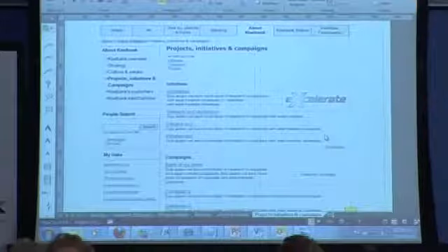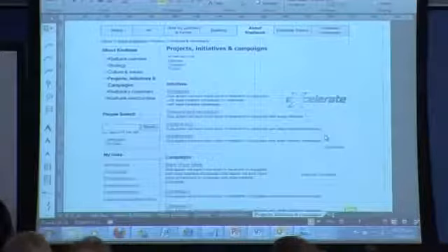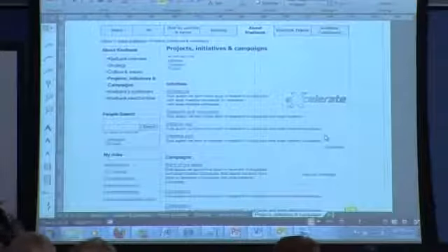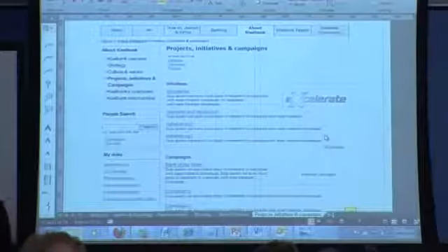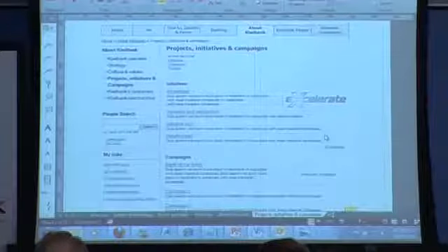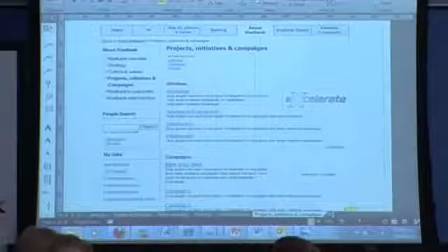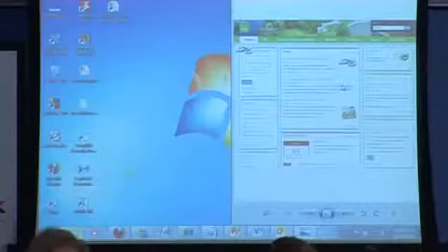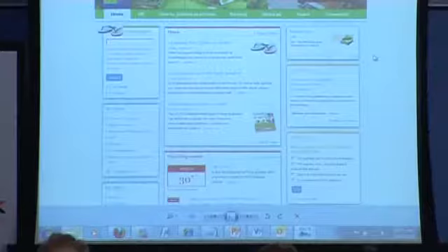You can actually go quite into detail of how this all works before you even do any of the development work, so that it's actually quite clear. It's clear to the end user, clear to the customer, clear to the project manager, so you go through that scenario and then walk through that before you build it. Yeah, exactly. This is storyboarding, but yeah, we call it wireframes. But this company, they're pretty good. It saved us a lot of to and froing, because it was quite obvious as soon as you looked at the wireframe, you can go to detail and then say, okay, and when you do a side-by-side comparison, it's exactly what they asked for.